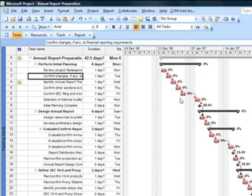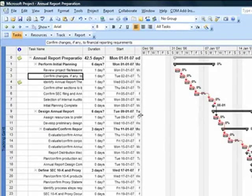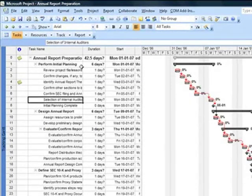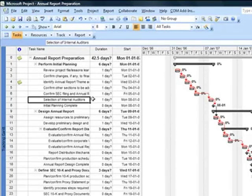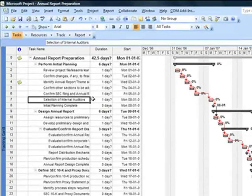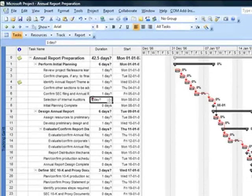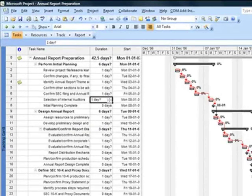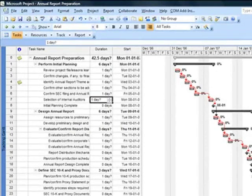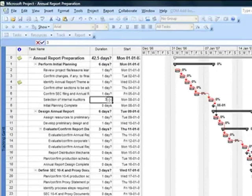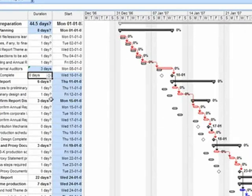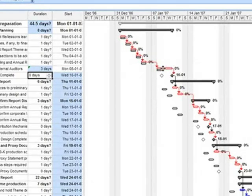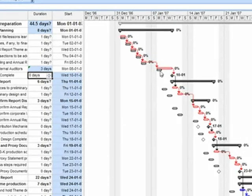The red or the blue bar will show me the actuals. To demonstrate it further, let's assume this activity called Selection of Internal Auditors was planned to take one day but in real life it is not taking one day, it is taking maybe three days. So I come here and I change duration to three. Just observe carefully as to what happens in the Gantt chart. If you see in the Gantt chart, the red bar increases its size and changes to three days duration, but the black bar is still consistent and remains to be of duration one day.